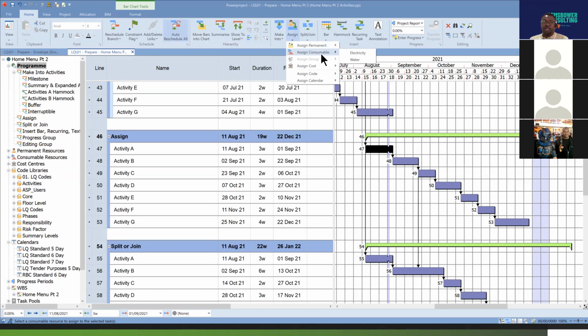That's what it is. Now, sometimes you could create a resource that combines both permanent resource information and consumable resource information. For instance, let's assume you have bricks as consumables here, and then you have a bricklayer resource, and you're saying, okay, for every bricklayer assigned, you want him to spend 350 bricks per square meters, okay?